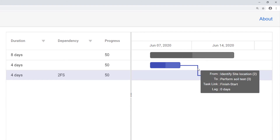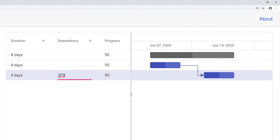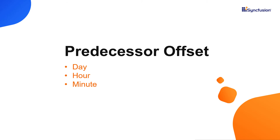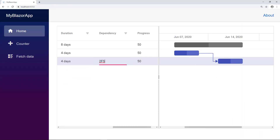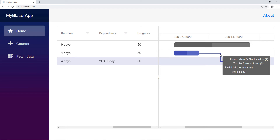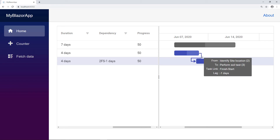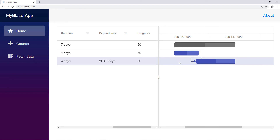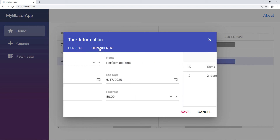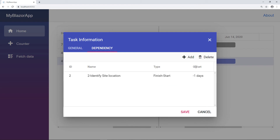There is no tooltip shown for invalid connections. When I hover over the connector lines, it explains the relationship between the two tasks. Notice the lag is listed as 0, which means there are no delays between the execution of these two tasks. I can add a delay by editing the dependency column. Predecessor offsets can be defined with three duration units: day, hour, and minute. To delay a task for one day, I just add +1D. You can see that one day is added in the chart, and while hovering over the connector, the lag is listed as one day. If I need to start one day before the end date of the second task, I add -1D in the dependency column. Also, I can edit the dependency using the dialog — I double click on the task, the information dialog opens, and in the dependency tab I can add or delete the dependency.